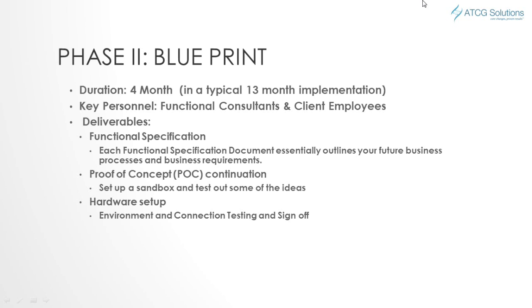Do not take this point of time to streamline your business process. Before blueprint, you should know your business process, or else you will drag along the business blueprint period. Usually, functional consultants are not business process consultants. Therefore, you may be wasting a lot of time and money in this phase if your business process is not complete before blueprint phase.